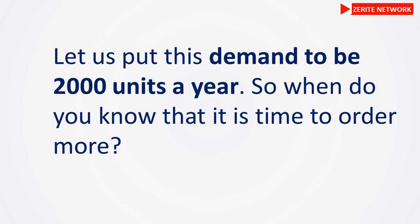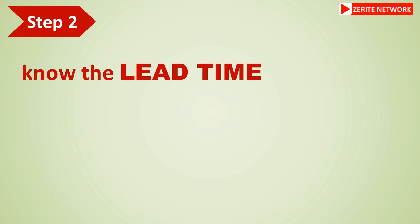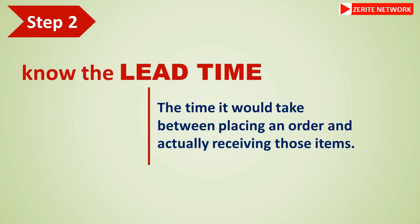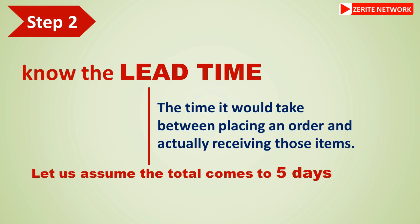So when do you know it's time to order more units? Remember, you cannot order blindly because that means incurring pointless costs. What you need to know next is lead time — that is, the time it takes between placing an order and actually receiving those items. If you are employed and in charge of procurement, you also need to factor in the time taken by your purchasing department to execute these orders. Let's assume the total lead time is five days.